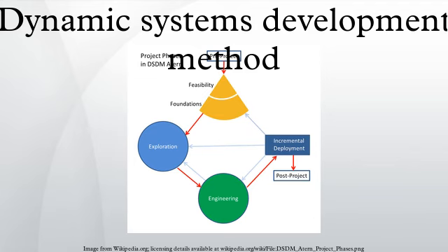The process overview figure also shows arrows going back to previous stages. For example, there is an arrow from implementation to the business study. If a big functionality has been discovered during development that couldn't be implemented, it might be possible to start all over by defining new requirements in a business study. Similarly, there is an arrow from implementation to the functional model iteration. Functionality might be omitted during a previous functional model iteration because of time or budget constraints.